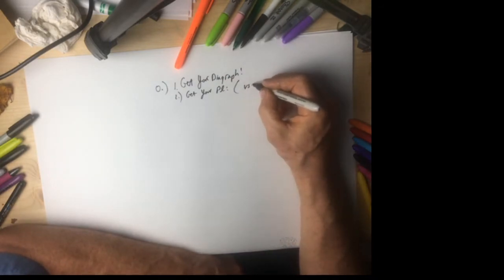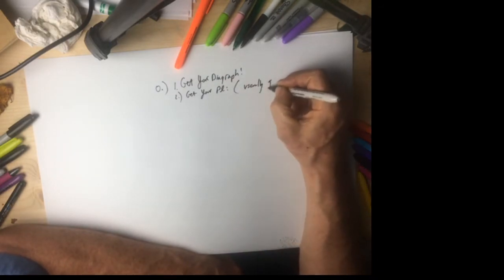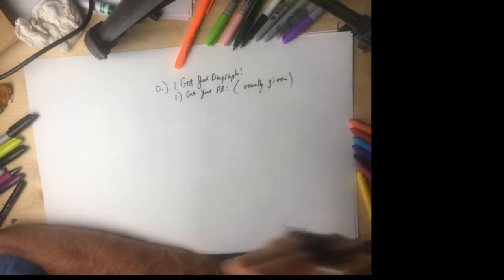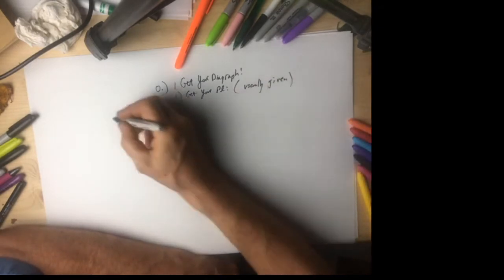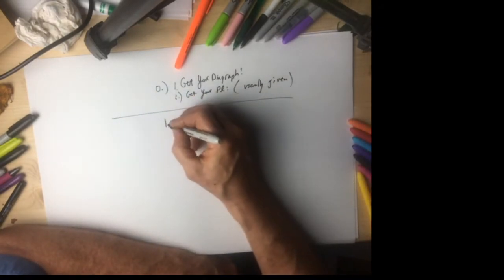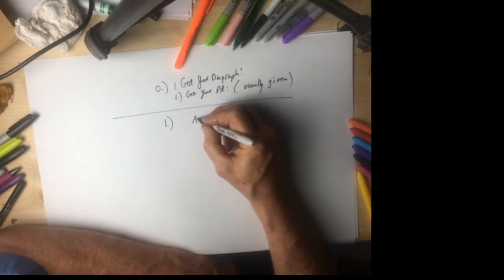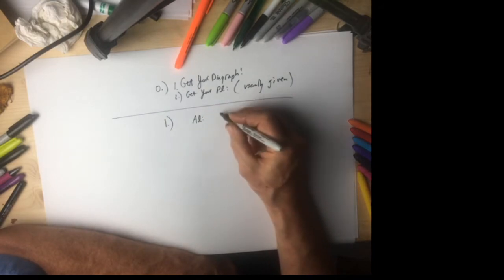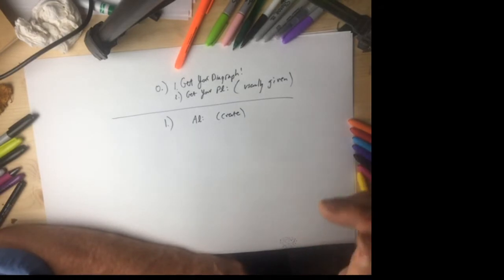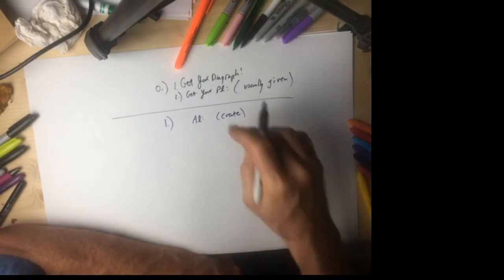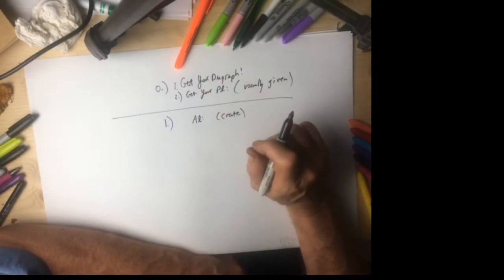And it's usually given. But we're going to learn to do it without a priority list, and you'll make it. Now, once that's done, the first thing you do is you create an available list. How do you do that? By checking what doesn't have an arrow coming to it.